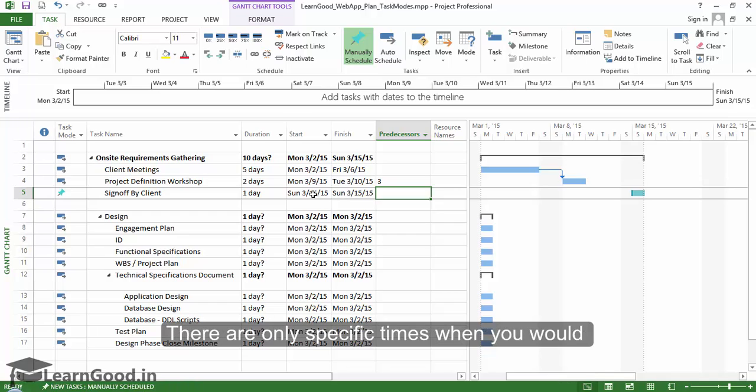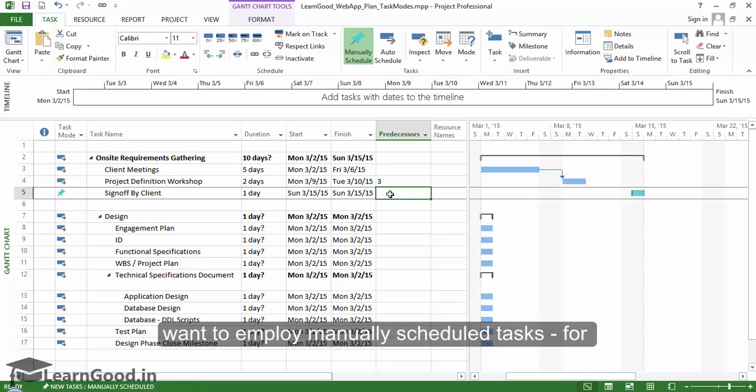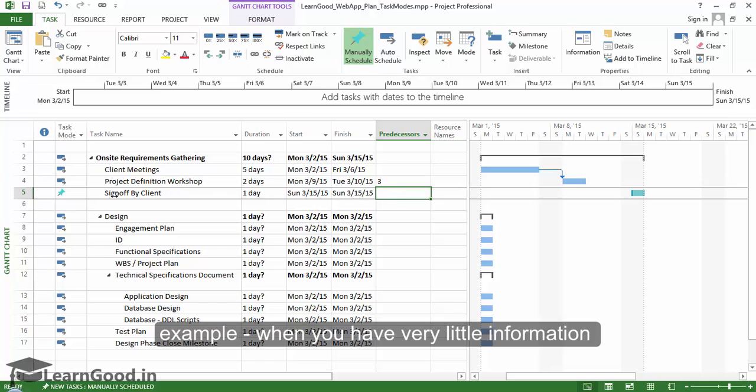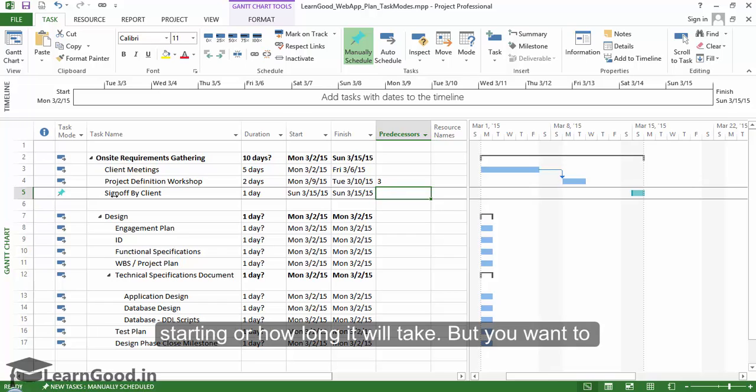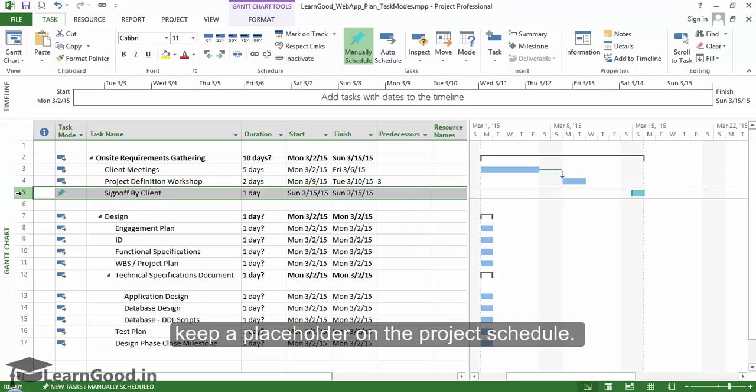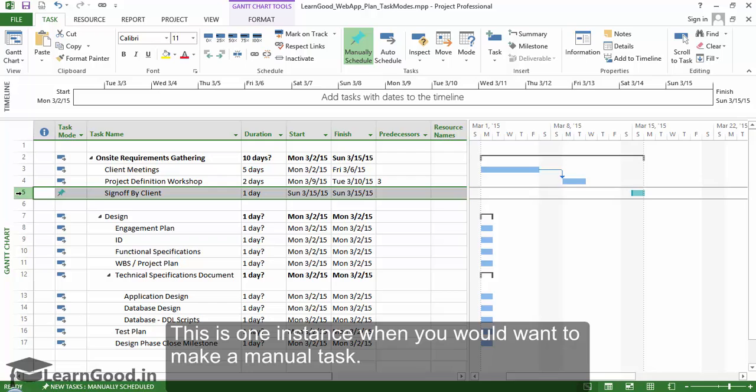There are only specific times when you would want to employ manually scheduled tasks. For example, when you have very little information about a task and you don't know when it is starting or how long it will take, but you want to keep a placeholder on the project schedule. This is one instance when you want to make a manual task.